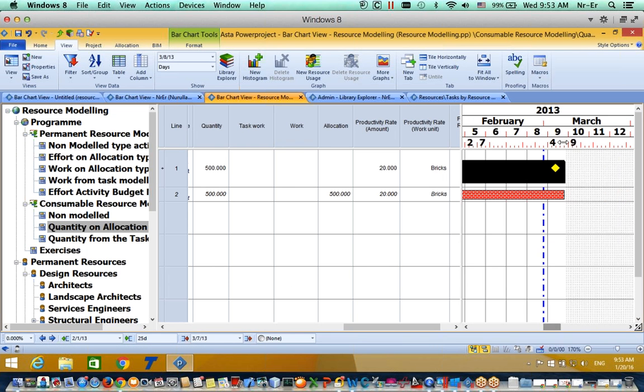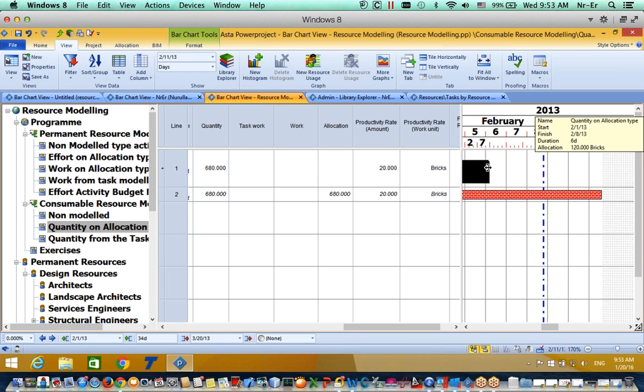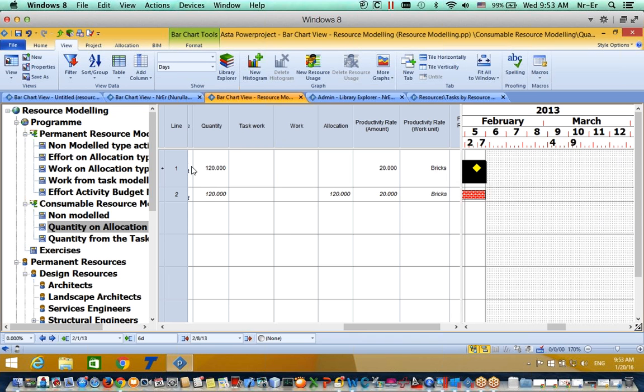Or I can show you that I am extending my duration and my quantity, how many bricks I need, it is showing over here. And I am saying that this is just 6 days work, and the system is calculating the quantity also. Actually we are not doing it in the opposite way, it is a better way to just give the quantity.